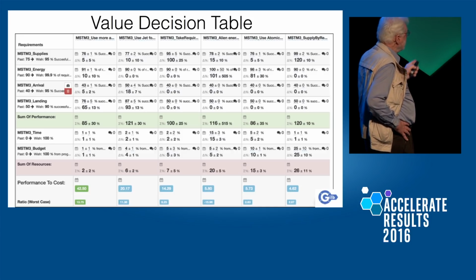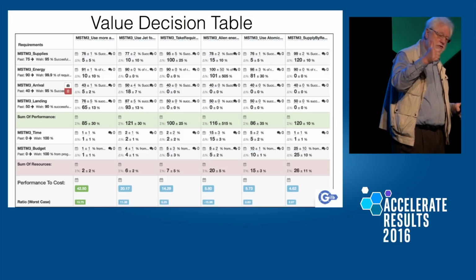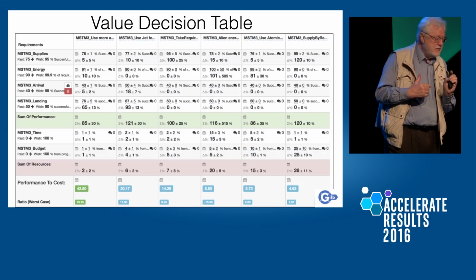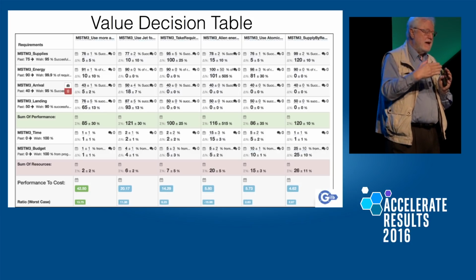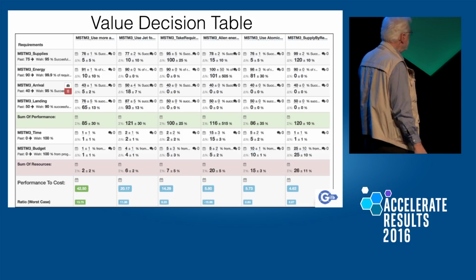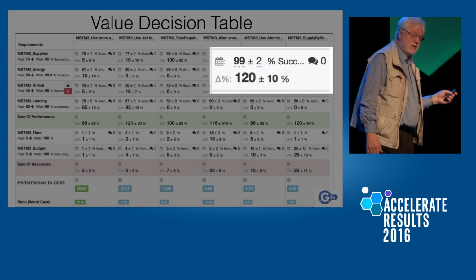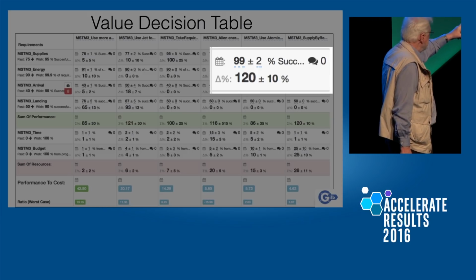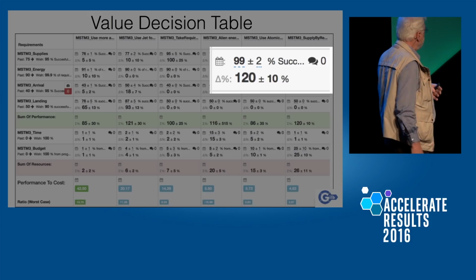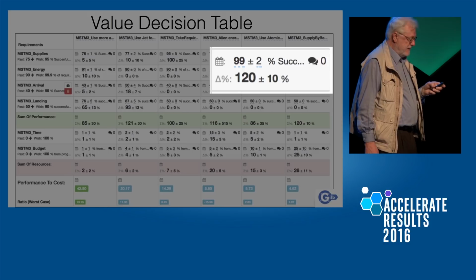Okay, and you can refine that table anytime you like with better estimates and stuff like that. But this is literally, time and time again, a 1 day draft exercise to make sure that you have a fairly decent set. Now the point here is we've already decomposed. Let's say you have a 10 by 10 table. You have 100 intersections. Every intersection is a value intersection. Every intersection is an opportunity to deliver, using some part of that strategy, some degree of that value. So if you just scan the numbers, and the one in the upper right-hand corner was a big number, you say, that's a very high value. Then you ask the question, using that particular architecture, can I find a small component of it that allows me to plug it in and see what happens, and see if it indeed does give those values we've estimated or not.